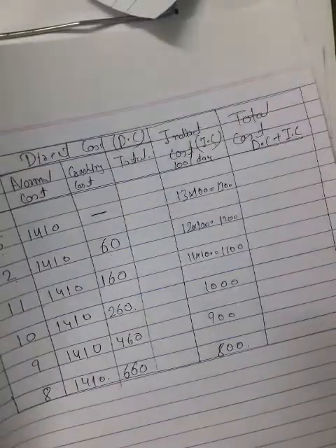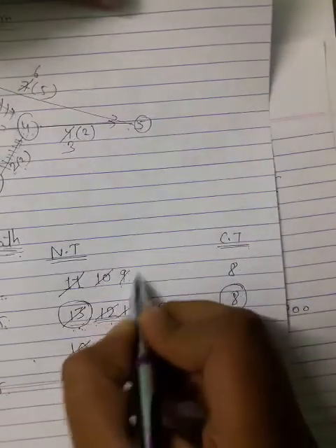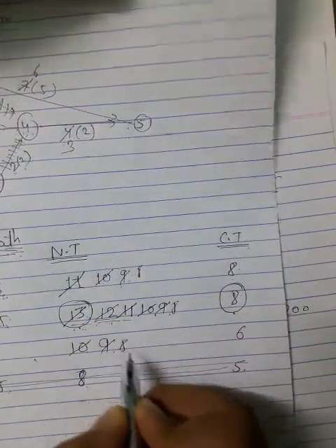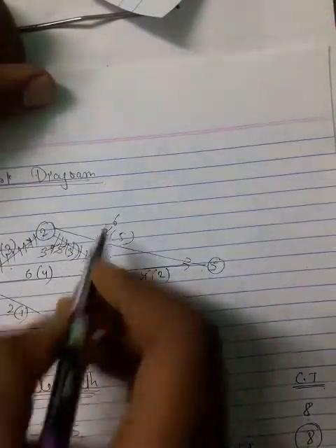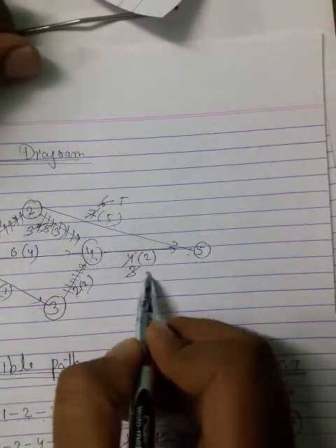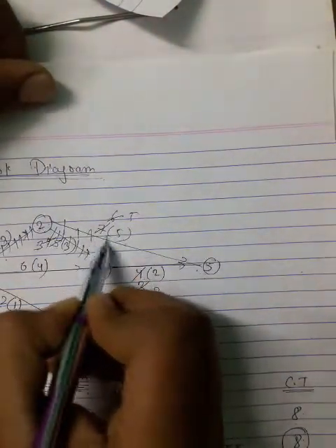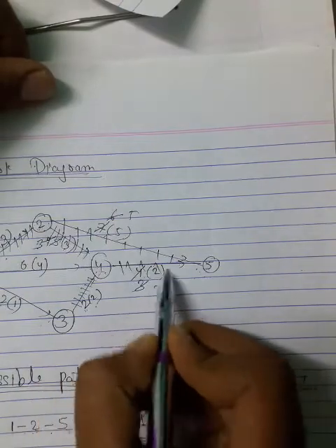Again, move to the network diagram, right here crashing is over. Now a little bit of solution I have to make. Here the 2 to 5 activity at crash will become 5, and I have crashed the 4 to 5 activity, that will become 2. So this is over, crashing.